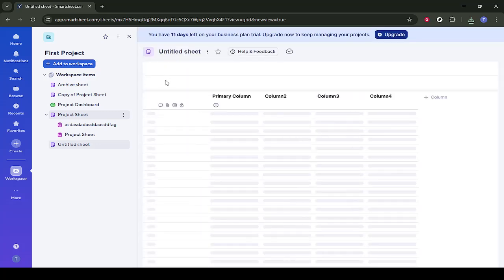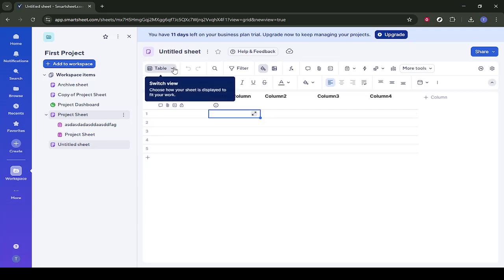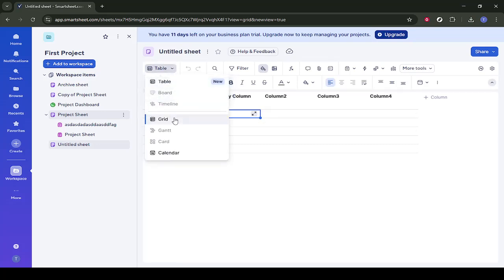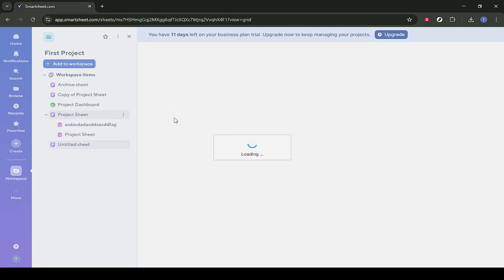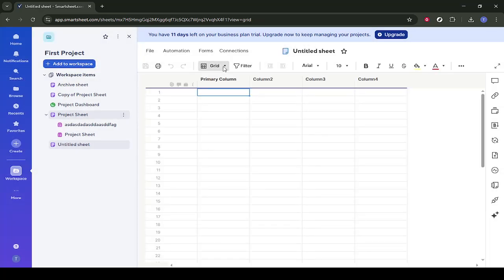From the drop-down, choose Create from Template. Smartsheet provides pre-built automation templates, which makes this process much faster than building everything from scratch. In the template gallery that appears, select a template that is based on a date trigger. Then click Use Template to load it into your sheet. This creates a new automation rule that you can now customize.